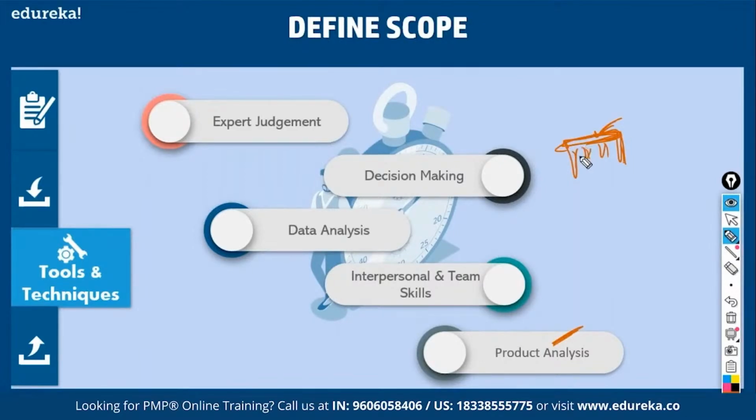So you break down the product into smaller and smaller components and you understand what value each of these components contributes and at what rate you can buy without compromising on quality. That is, you have to maximize value and minimize cost without compromising on quality. This is what is called product analysis. Some people call it value engineering, systems engineering, or functional analysis, whatever it is. You have to do all this in order to define a product.